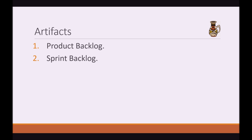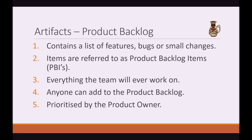Artifacts. We have two artifacts in Scrum: a product backlog and a sprint backlog. The product backlog contains a list of features, bugs, or small changes that could ever be done to the product — essentially a long list of items prioritized by the product owner. These items are referred to as PBIs, or product backlog items. Anyone can add to the product backlog, but it's the product owner who prioritizes the items to decide which gets done first.